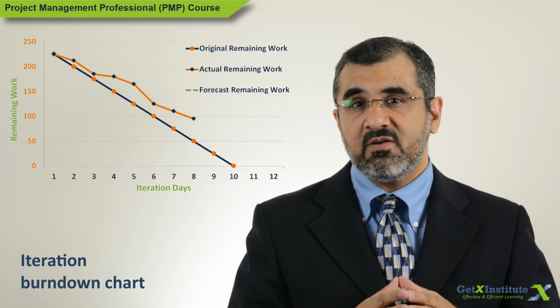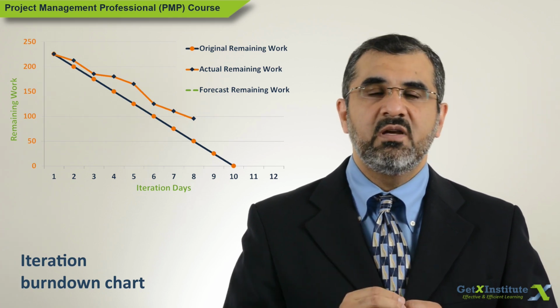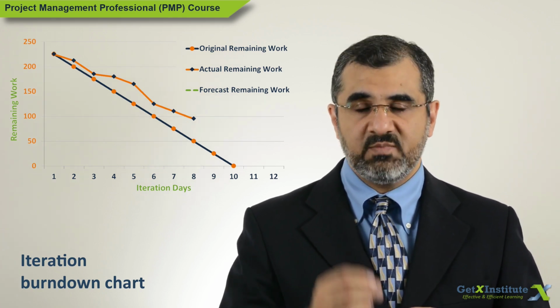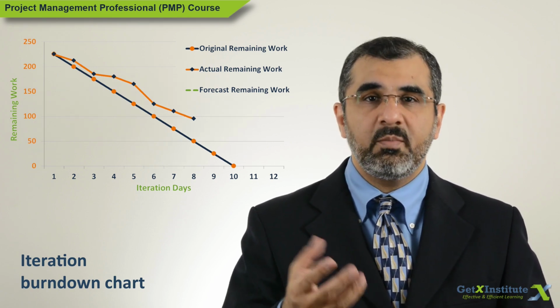Therefore, we can also conclude that the iteration burndown chart should never be used to establish how much work has been completed. For that, there is the iteration burnup chart.